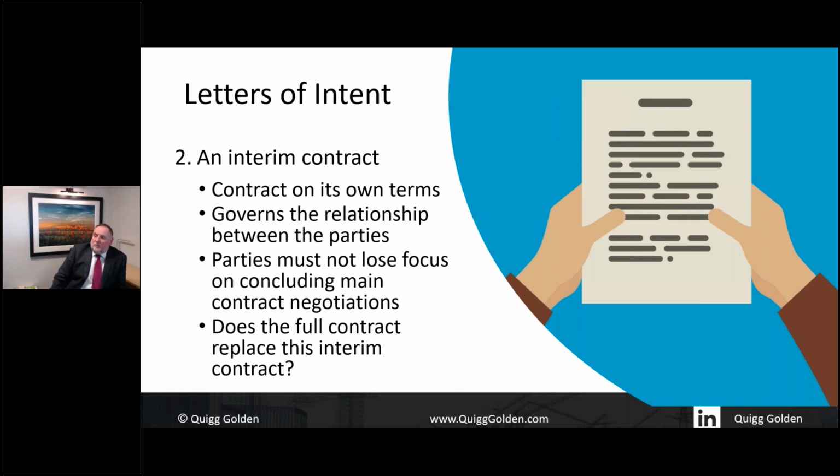So now we're in a situation as a main contractor saying, well, that's great, I can go and start working. If we enter into a main contract, I'm going to get paid under that main contract for this work. And if we don't enter into a main contract, it doesn't matter, because I've got a promise here, an enforceable promise by the employer to pay me for doing the work I've done on site. So that then allows the works to start. Okay, the employer's delighted because the building's underway. The main contractor's pleased because he's got a spade in the ground.